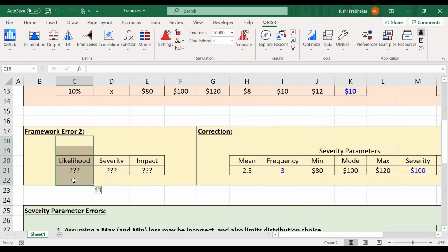Maybe you're looking at power lines or something, or they refuse. So the risk event is that you are denied easy access through private property, and you have to go the long way around. Maybe you have to use helicopters, I don't know, something. But it's more expensive and you're certainly not what you planned for. So the risk event is a genuine one-off, and you will allocate to that or estimate for that the likelihood that it occurs.